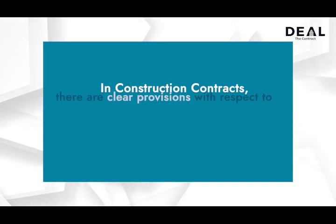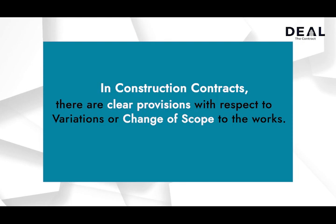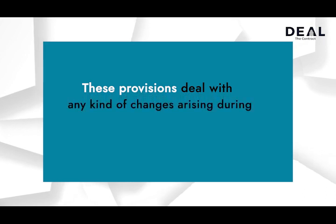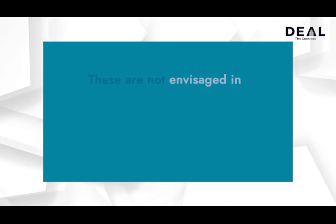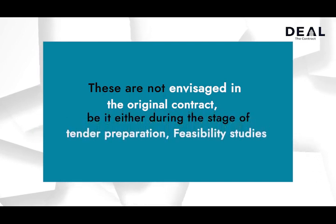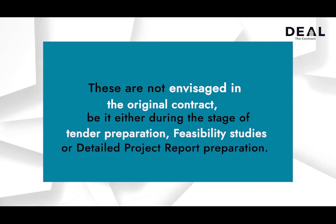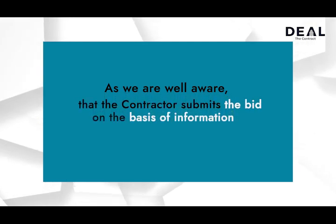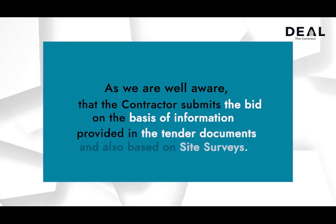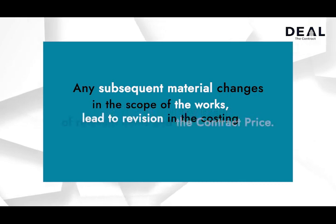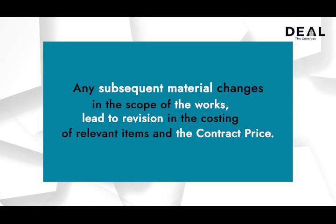In construction contracts there are clear provisions with respect to variations or change of scope to the works. These provisions deal with any kind of changes arising during the currency of the contract. These are not envisaged in the original contract, be it either during the stage of tender preparation, feasibility study stage, or detailed project report preparation stage. Any subsequent material changes in the scope of the works lead to revision in the costing of relevant items and the contract price.